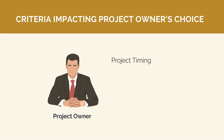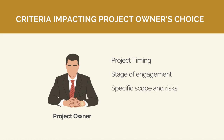The key factors that impact this decision are: project timing — meaning how urgently does the project need to be completed, as it may be hard to run a proper tender and get competitive pricing if urgent; the stage of engagement — at what point in the project lifecycle does the owner want to engage a contractor, whether during feasibility and concept design or only once the design is developed; the specific scope and risks they want to outsource, such as design or the maintenance phase, and how well the project scope is understood; and finally, the level of ownership the project owner wishes to retain and their capability to manage the works — whether they want a turnkey contractor or to be involved in every decision.